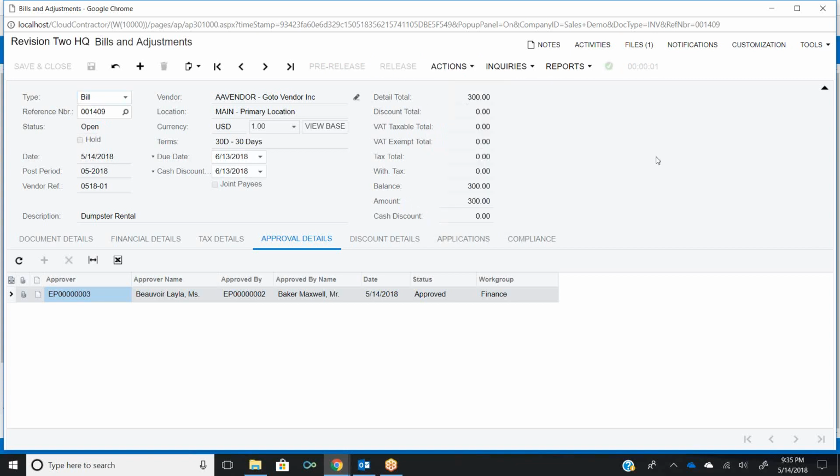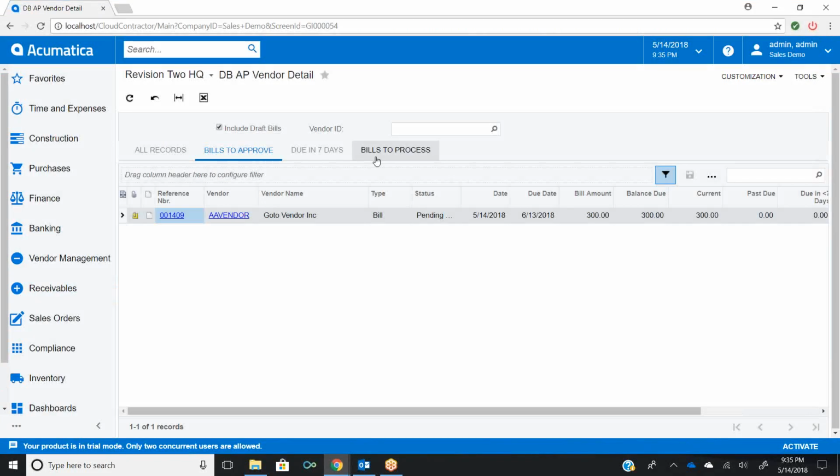So we went through a workflow on creating a commitment against the project. We went through routing that for approval. We drilled down from a dashboard to mark it approved. We took that into an AP invoice, attached backup for the invoice, and then routed it for approval, ultimately getting it ready to be paid. If you have any questions, feel free to email or call, but I think that closes out the open item that we had mentioned to do.